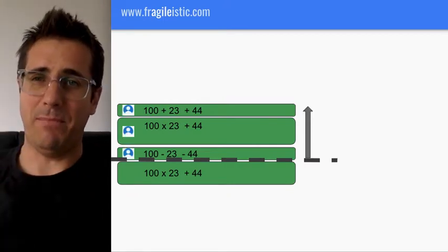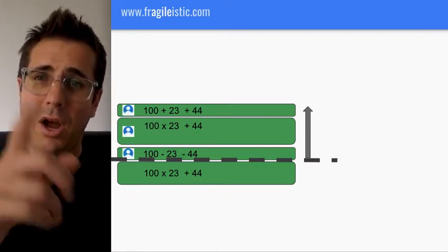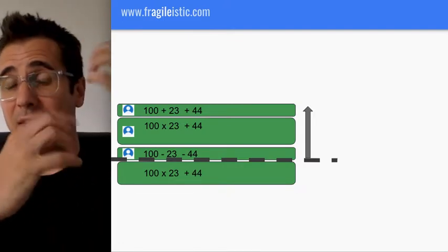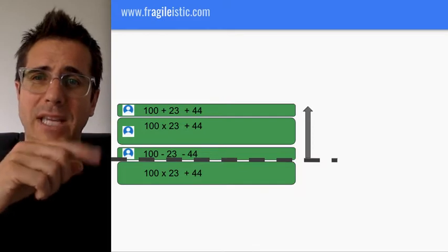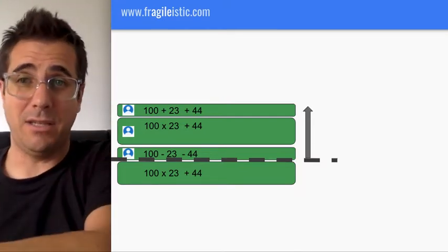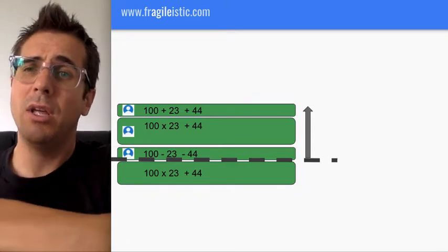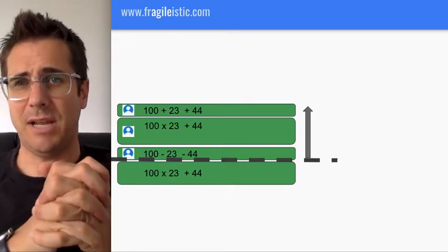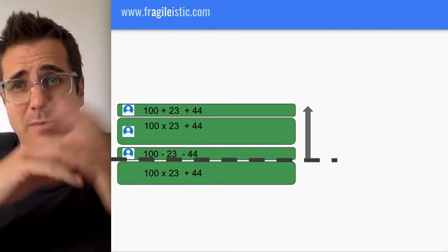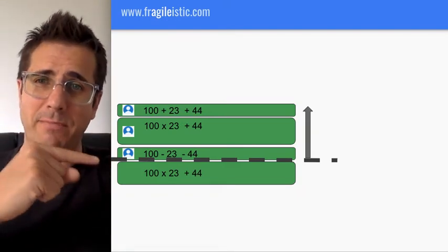The last thing about planning is you are then going to say, okay, who's going to do what? Now you might have a discussion at the beginning of planning about your capacity, by the way. So you're going to base it on the velocity, but you might go, look, who's available next sprint? And if you've got half your capacity from Melbourne Cup coming up here in Australia, you will drop that velocity down. So you'll say, well, we normally do 5, but we're all losing a day. So let's take it down to 4. Let's be conservative.